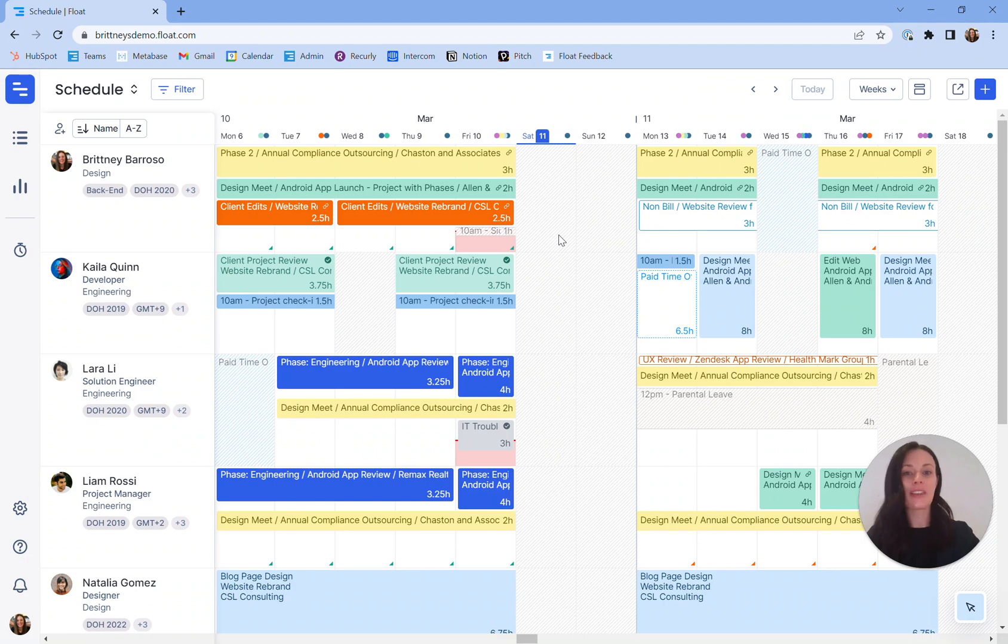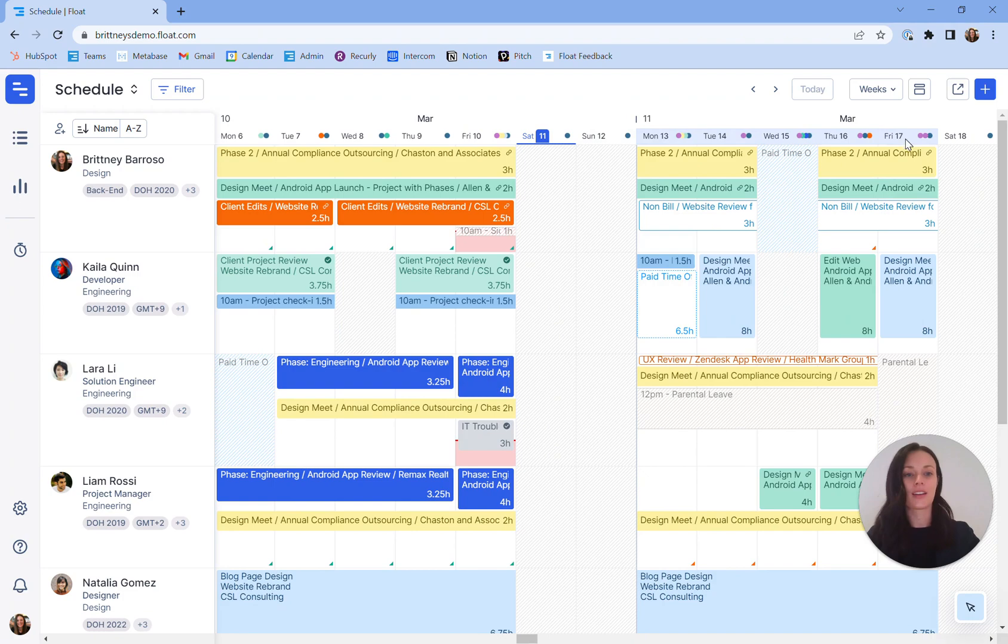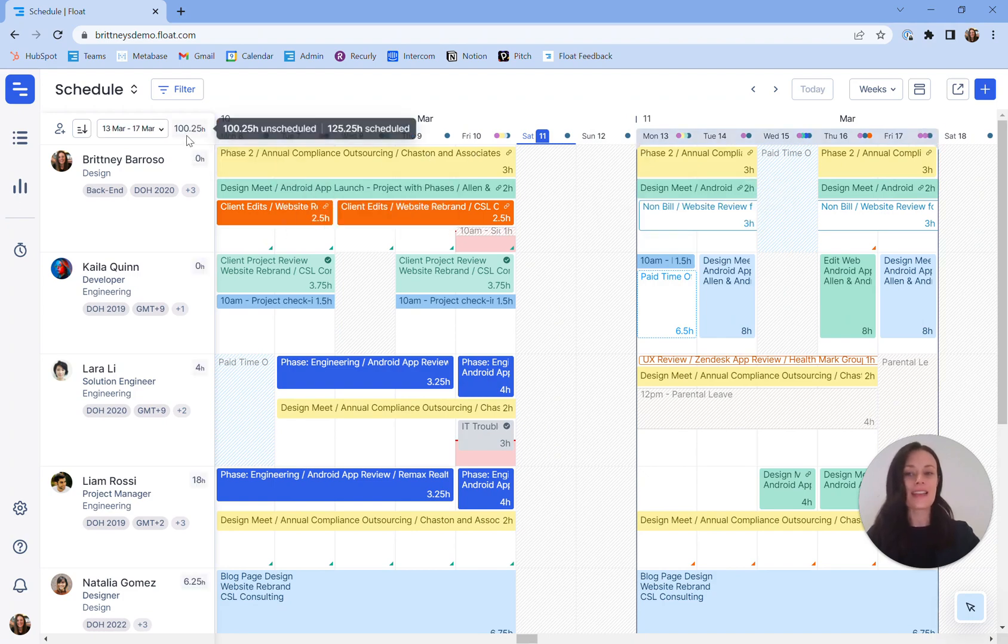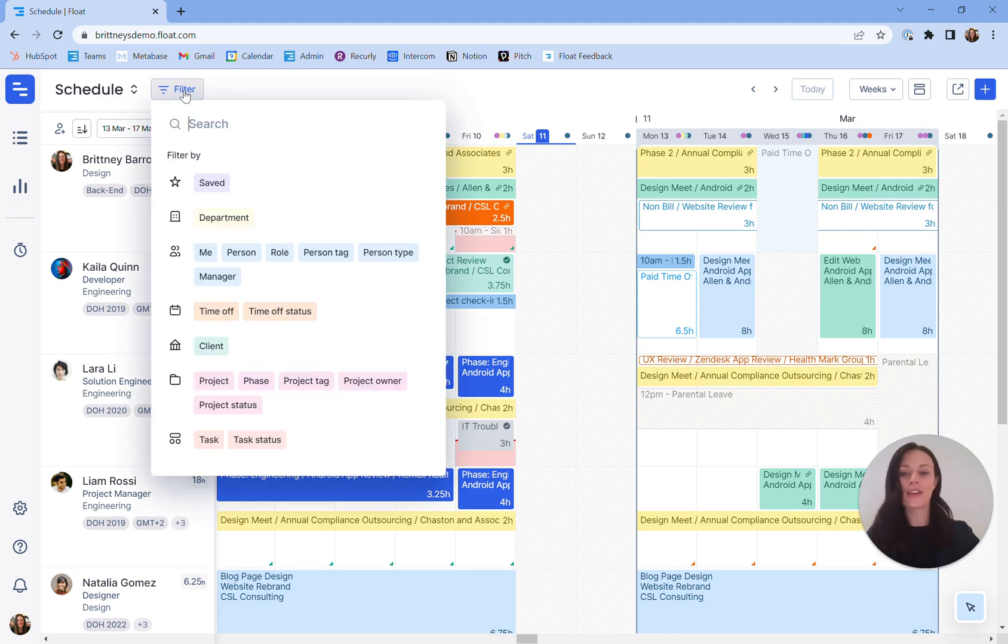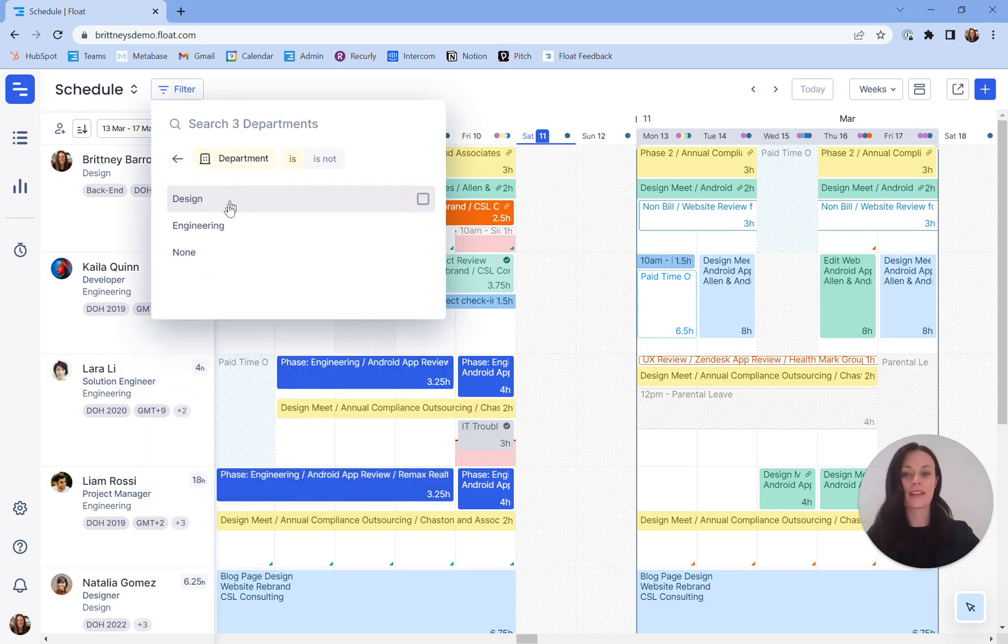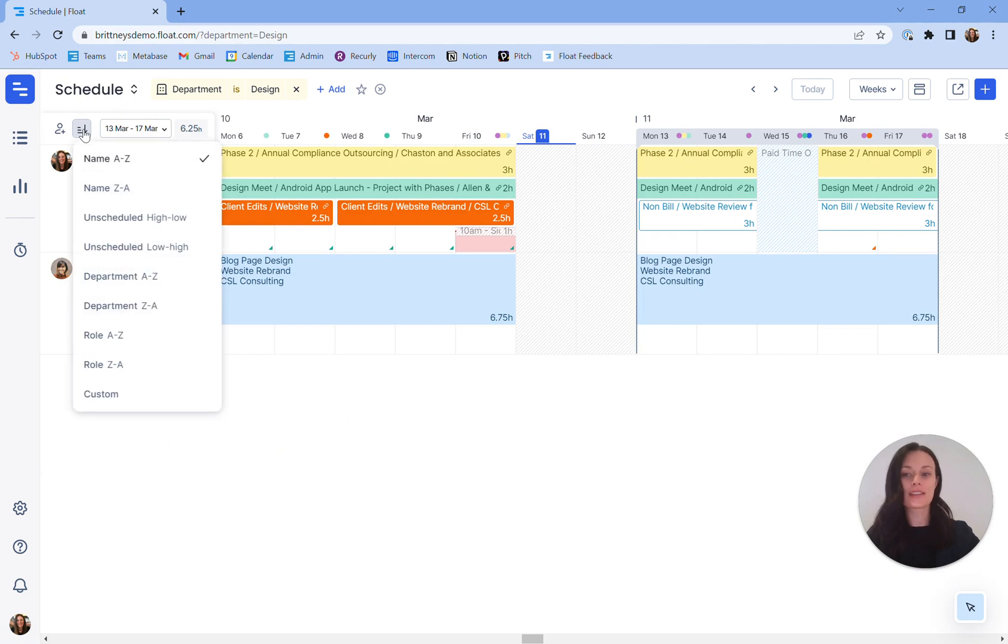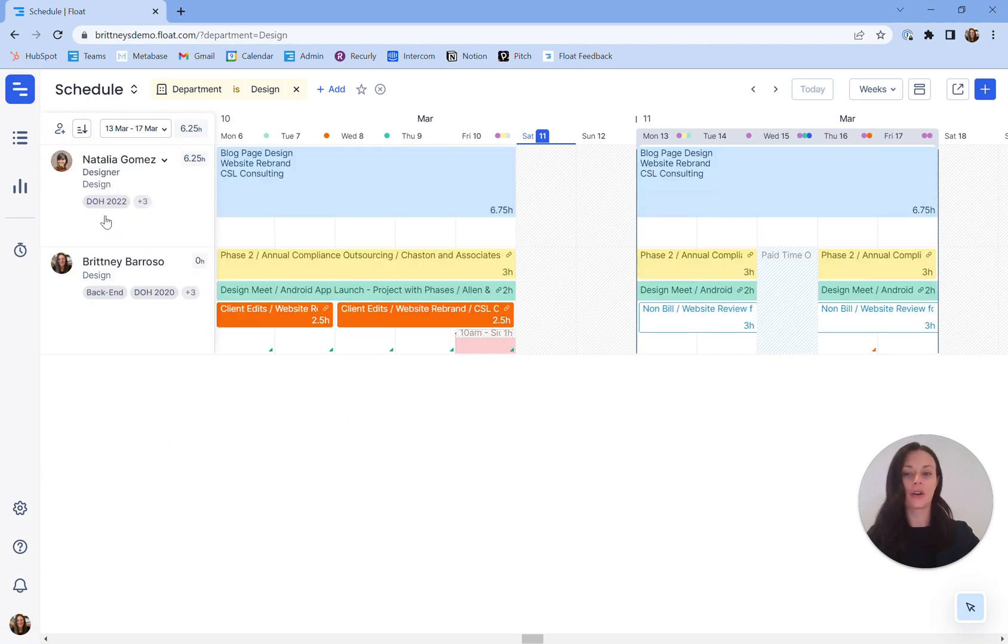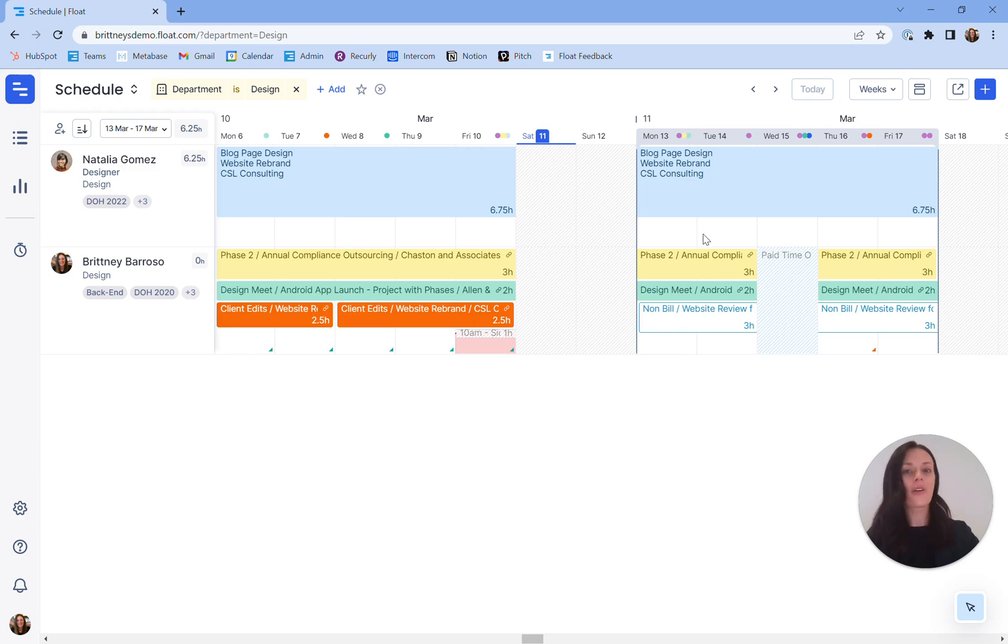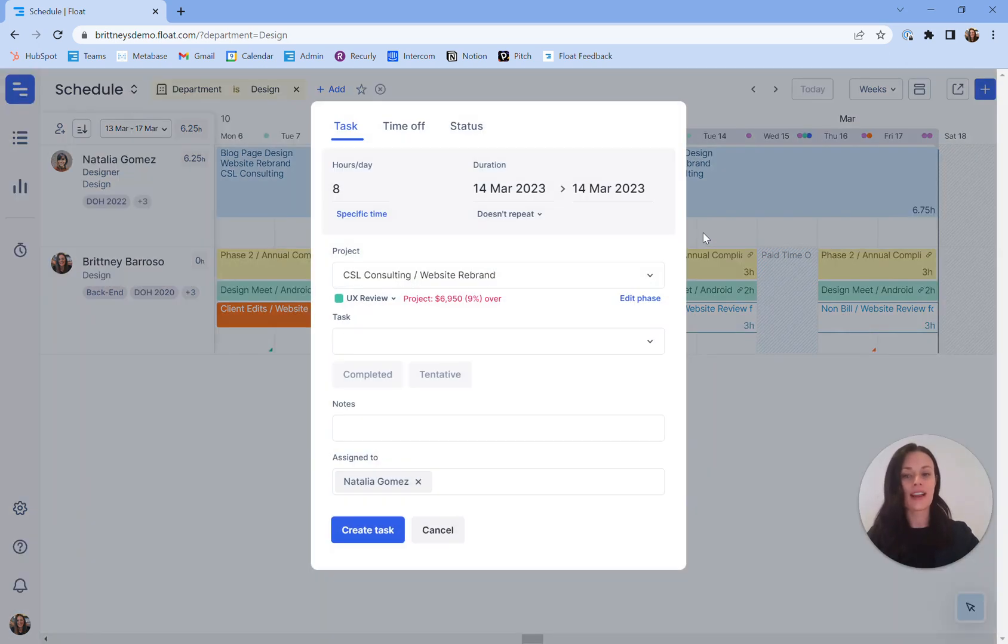I know that I need a designer for a last minute project that needs attention next week. I'll initiate my loop here and now I see data analytics on the left hand side. I'll add a filter for my design department and now I'll sort this data for unscheduled high to low to identify that Natalia has 6.25 hours of availability next week so I'll go ahead and allocate project work to Natalia knowing that she has the availability to complete it.